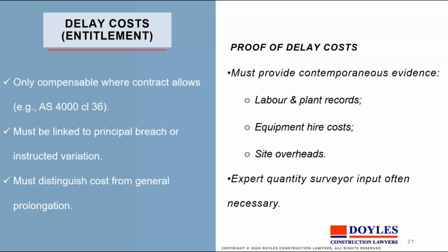Oftentimes a contractor should have a separate equipment company which owns the equipment and leases it to the operating company, and under properly drawn agreements that can require and give meaning and proper recording to the equipment hire that the operating company incurs while there's a delay.